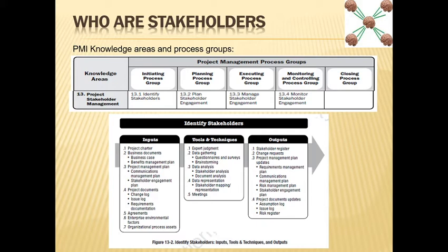Then you have to see the business documents, like the business case: what is the business case, and why are we doing it? For example, in the telecom project of installing sites, you need to take approval from the site design team, approval for the plans, and approval for the budget. So you need to have a business case, and based on that business case, you need to identify further stakeholders.